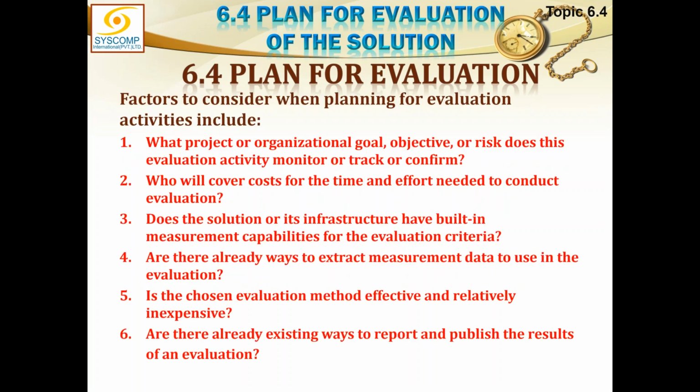Factors to consider when planning for evaluation activities include: number one, what project or organizational goal, objective, or risk does this evaluation activity monitor or track or confirm? Number two, who will cover cost for the time and effort needed to conduct evaluations? You see, money and time will be spent in this. Who is going to cover for that?